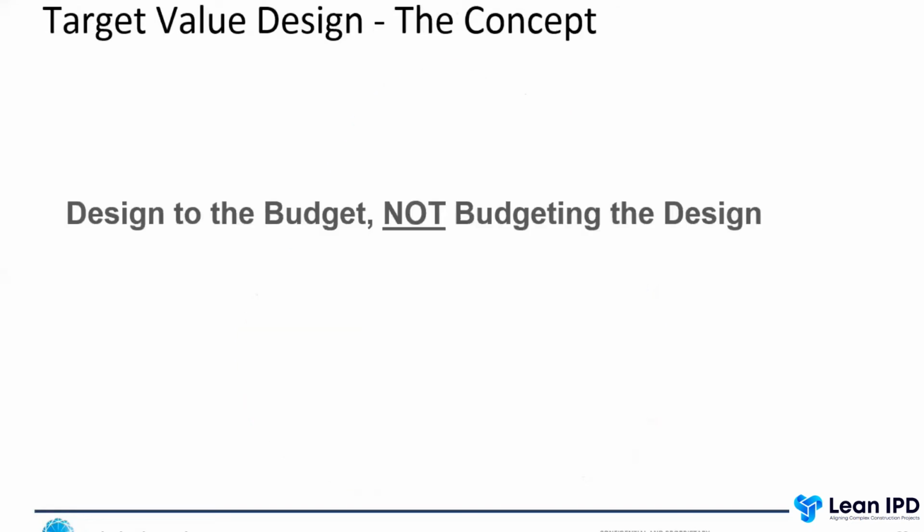Now, the reason I lay this out is because the team is at risk and we've really only got one stage gate. So how do you make sure that you get through design without busting your budget and losing all your profit, and also get through construction? So in the design phase, we have a concept of target value design. And what we're doing here is making the budget an input to the design process. So every design decision, everything that we talk about incorporates cost into the equation. Pretty much any concept that gets brought up, my first question will be, okay, how much does it cost? And does it affect the schedule?